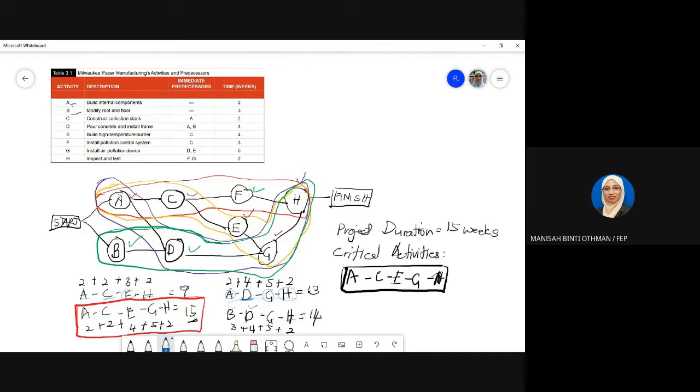Let's say to complete your assignment, you need first to form a group or teams, and then find the information, and then discussion, or assign tasks, and then discussion, and then write out the report, and then double check the assignment, and then binding and submit. So you identify the activity.